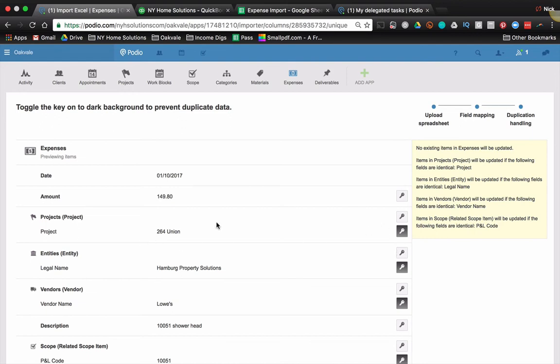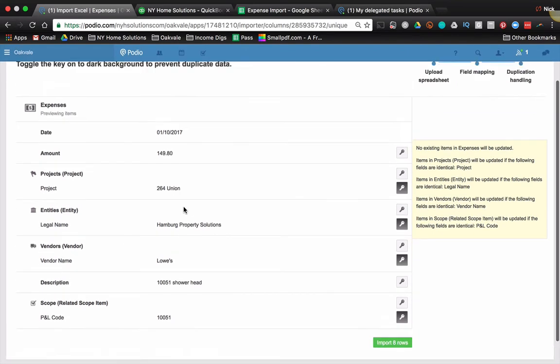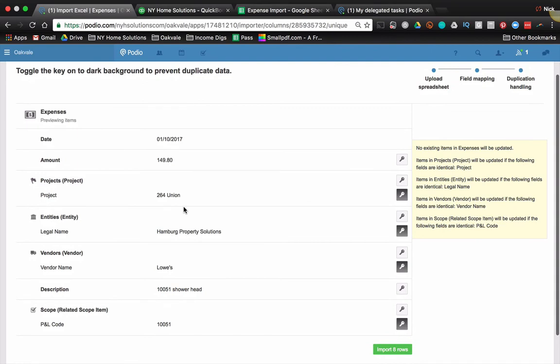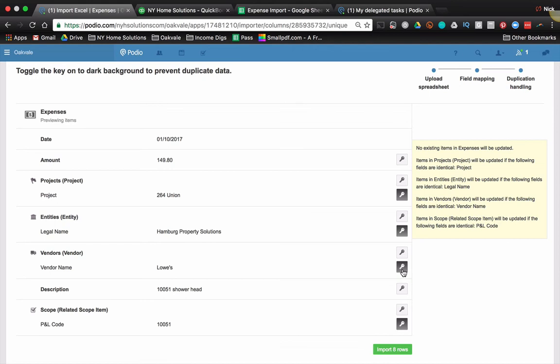I'm importing, I don't know how many items here, eight rows. I don't want it to create eight different new 264 Union projects. That wouldn't make any sense. So I need this primary key to be set. Same thing with my entities and same thing with my vendors. Now vendors is, I have most of my vendors synced up between QuickBooks and Podio. However, if there's a new one that hits QuickBooks, it is not yet in Podio. That's fine. What it'll do is it won't find it. It'll create a new one in Podio too. And that helps keep my vendors in sync.